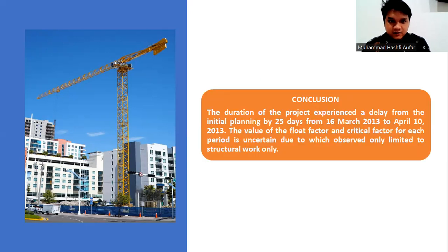That's the conclusion for this class about this project. The conclusion is that the duration of the project experienced a delay from the internal planning of 25 days, from 16 March 2013 to 10 April 2013. The values of the float factor and the critical factor for each period are uncertain because the observation was limited to structure work only.